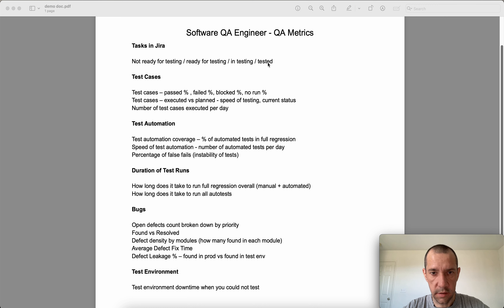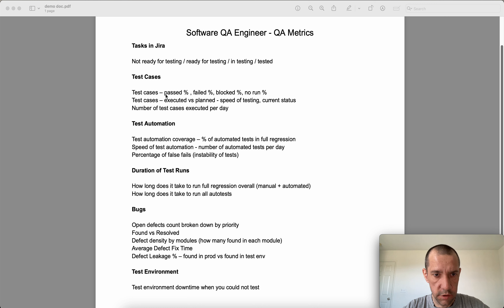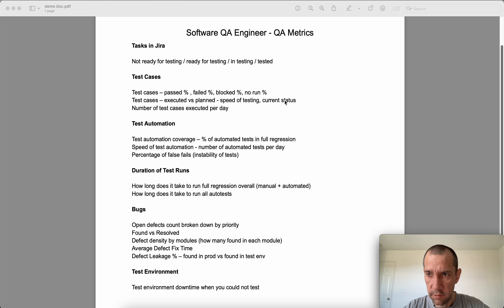For test cases, you can track the current state of execution: how many passed, how many failed, blocked, or not run yet. Also, executed versus planned will show you the speed of testing and current status — including whether you are going to meet the deadline or not, and the number of test cases executed per day.